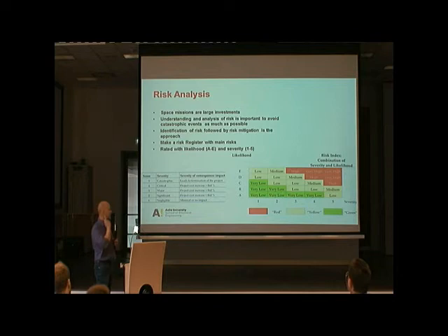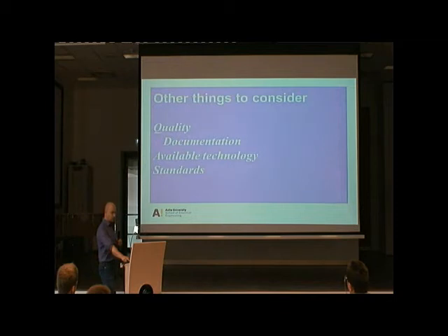So you have to go through all your risks, and for risk analysis in space projects, these kinds of risk tables are used. If you go for a mission, and you want to get the mission proposal accepted, you should never have anywhere a high or very high risk. Red color is prohibited. Otherwise, you are basically not getting your mission through, except in very rare cases. You should be in a medium or low risk area in most of your risk analysis.